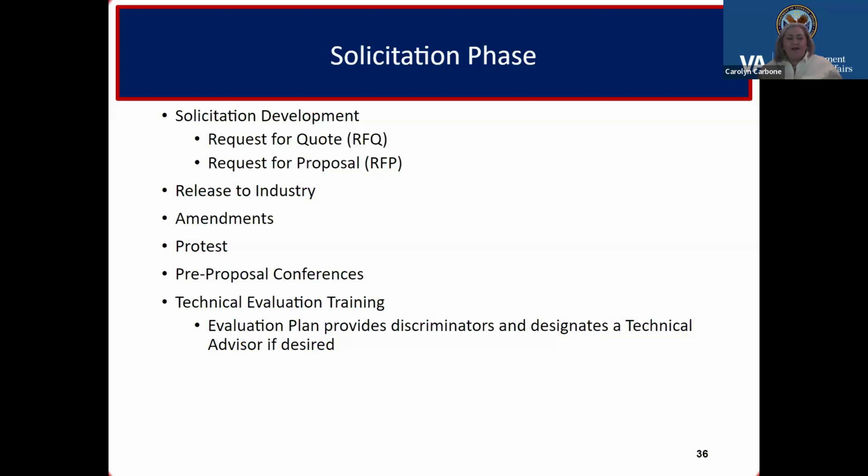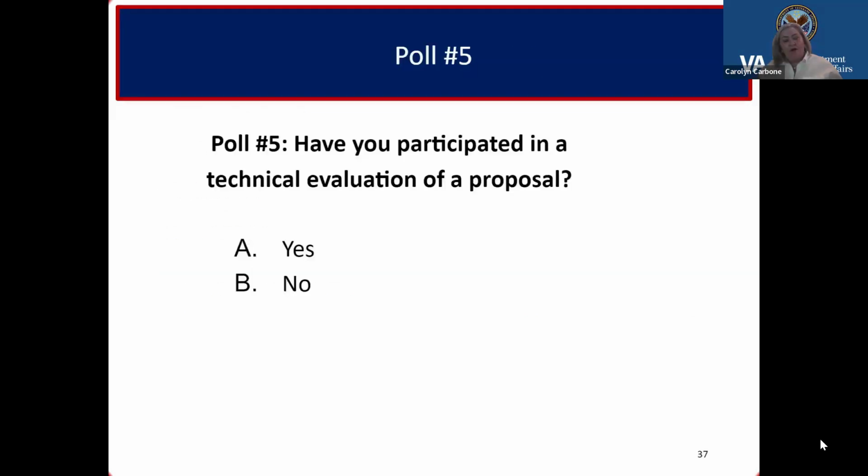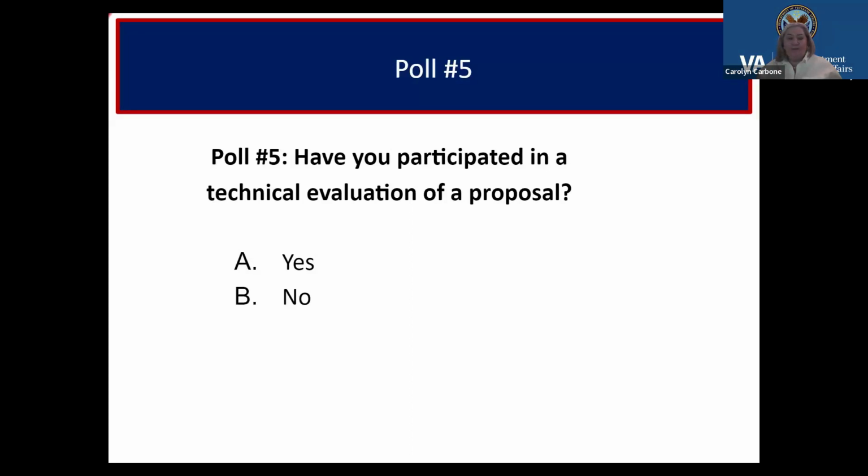Pre-proposal conferences are not generally used, but they're a possibility. And then our agency offers a technical evaluation training. This is right before a solicitation is going to close; we'll get together with the tech board and go over our process for evaluating the proposals when they come in. Okay, have you ever participated in a technical evaluation of a proposal?